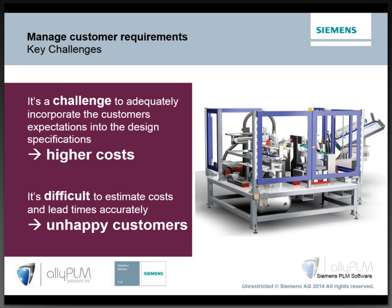Salespeople normally focus on closing a contract, with the minimal information needed to give the customer what he wants. After the customer awards the contract, engineering staff will often need more information to clarify the detailed specification. The challenge is ensuring the customer's needs are clear with enough detail for design and manufacture. The company will incur extra engineering time and higher costs if there's a misalignment.